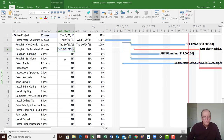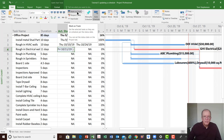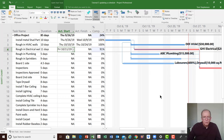It's still on track for 11 days so I'll leave that. Now I'll show you a little trick — you can calculate the progress, because theoretically the progress should be up to the current point. Assuming it's end of day Friday and I'm updating to Friday, it's not quite done. So I'm going to click the Mark on Track icon and click Mark on Track — and you see it updates to Friday, the work completed up to that point. It's not 100% done, it still has Monday's work to do.